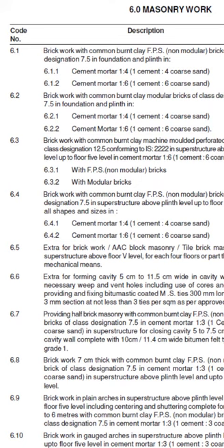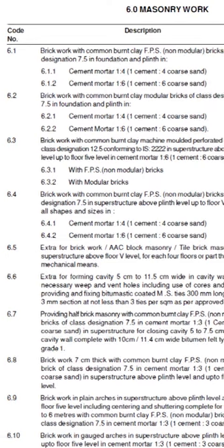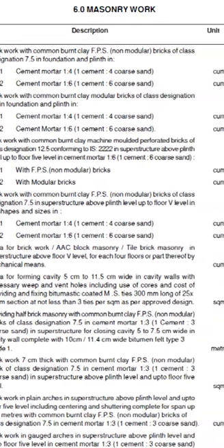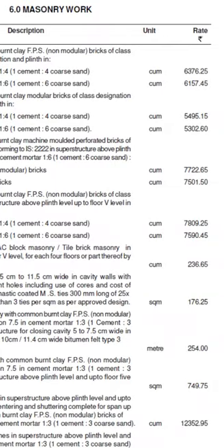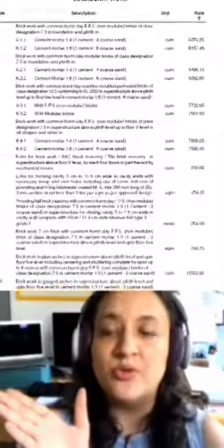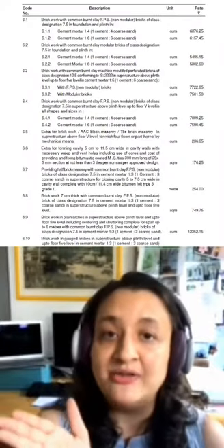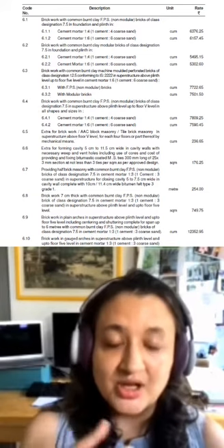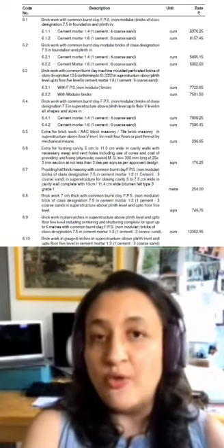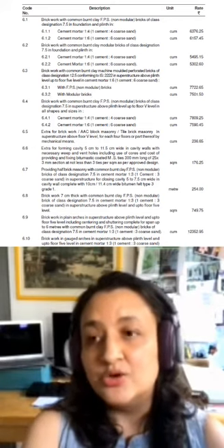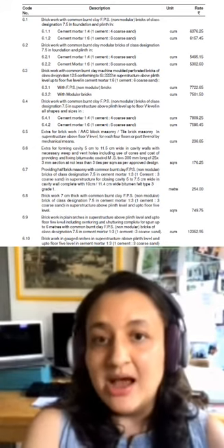The final point here is also that the DSR actually gives you some kind of base cost for each of those items. The idea is that the DSR is supposed to be used by contractors when they're bidding for government projects. So the government lists rates for each of these items for those bidders to use as their base rate.